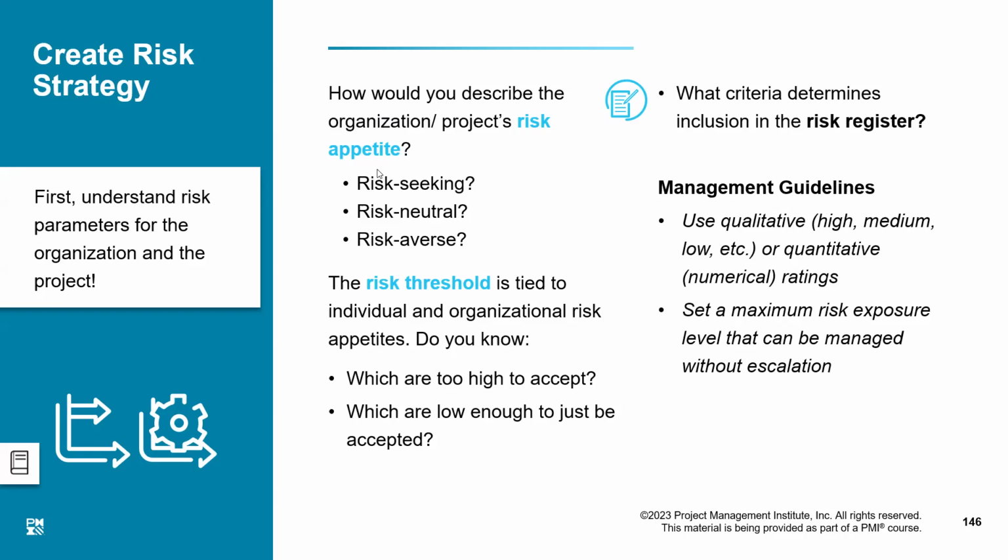Right? Therefore, I can say that for risks, we have got limits defined for the project manager, for the team member, for the sponsor, for other people. So if a risk is bigger than your project, then probably you have to forward it to the next higher level. Escalate it to them as if they can deal with it.